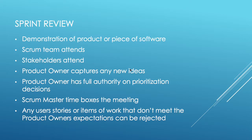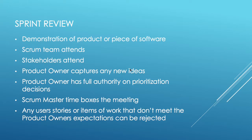Who's attending? The Scrum team attends: the product owner, the Scrum master, and the development team. You also have stakeholders — the ones that the product might be getting delivered to at the end of the day. They might also have requirements that they feed back as they watch the team demo. A single member of the development team might volunteer to conduct a demonstration of the product or the new piece of functionality they've been building.